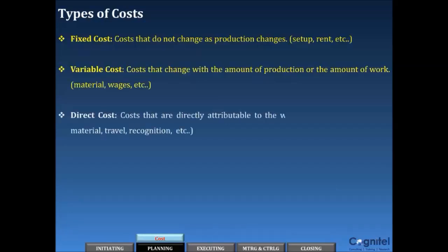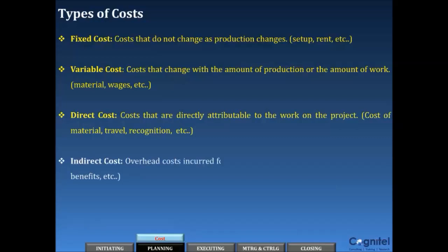Direct costs are expenses that come out of the project budget directly. For example, if you have outsourced some of your development work, the developers are expected to put in a specific amount of time, which is then billed for. The developers' salaries are direct costs. Indirect costs are those that are shared across multiple projects. Indirect costs are sometimes also referred to as overhead costs.